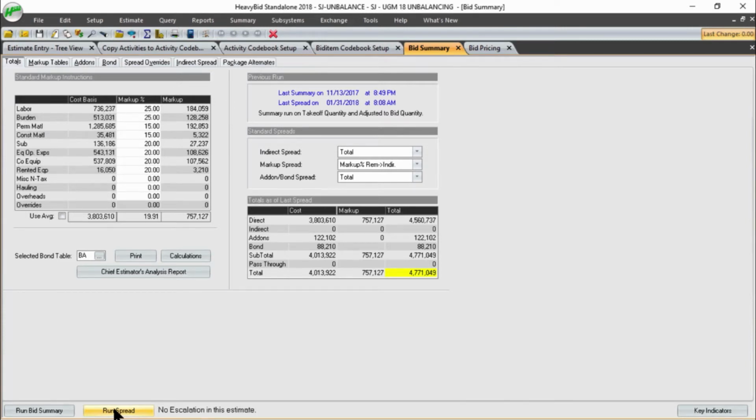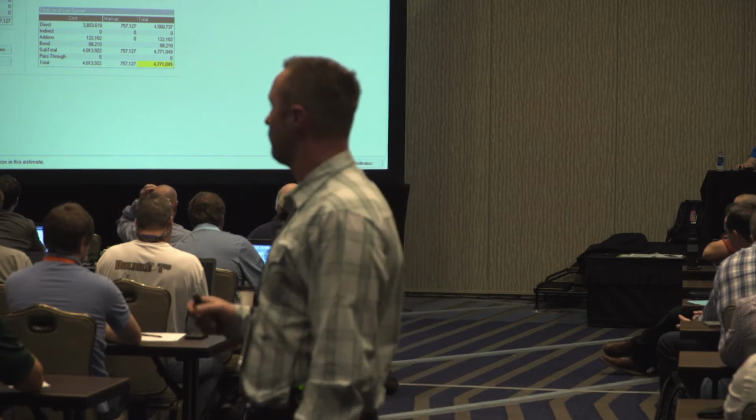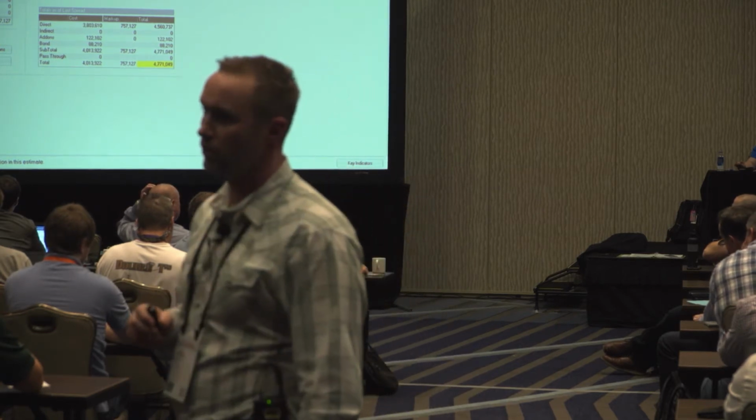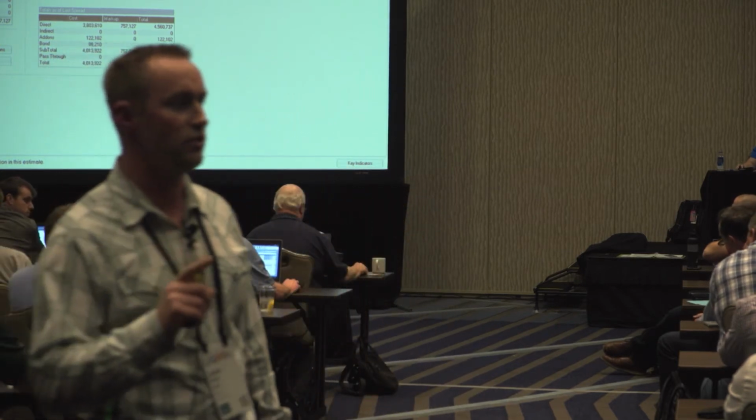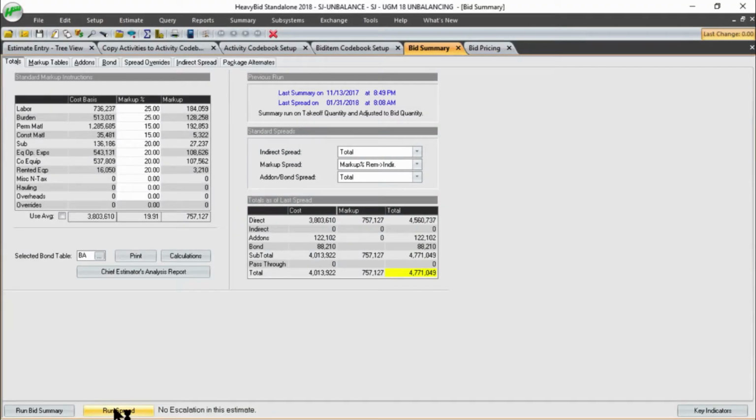This is the total desired bid based on the takeoff quantities. This thing thinks you are exactimators and that all those quantities you put in are right on the money, and that's exactly what's going to be built out. So when you're doing this, it's hard to cut it right to that desired number unless you've built some contingency into your takeoff quantities.